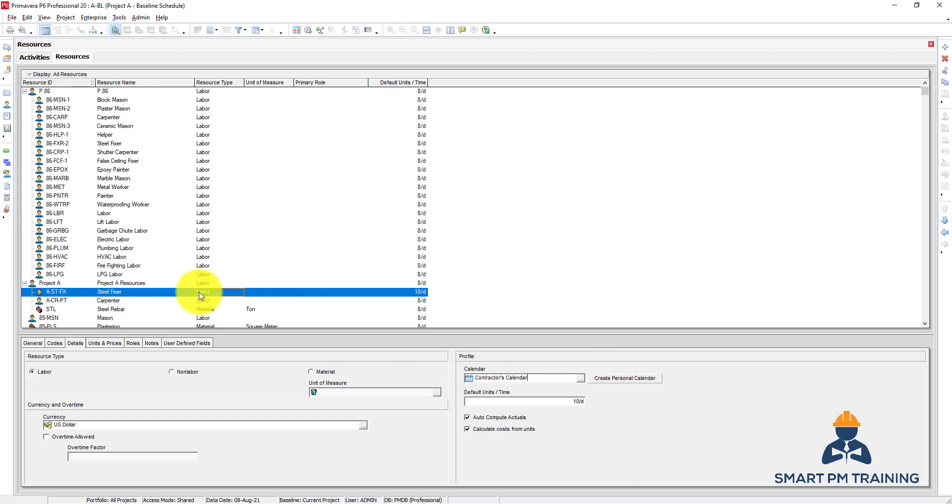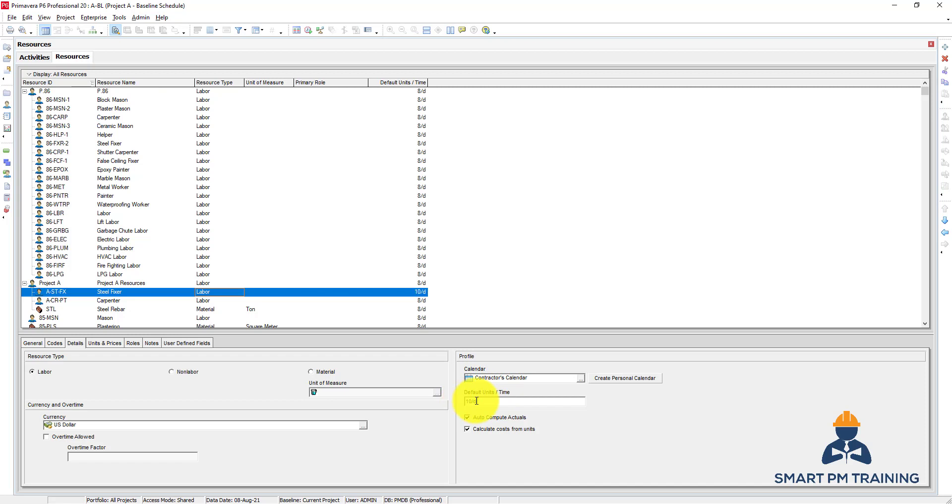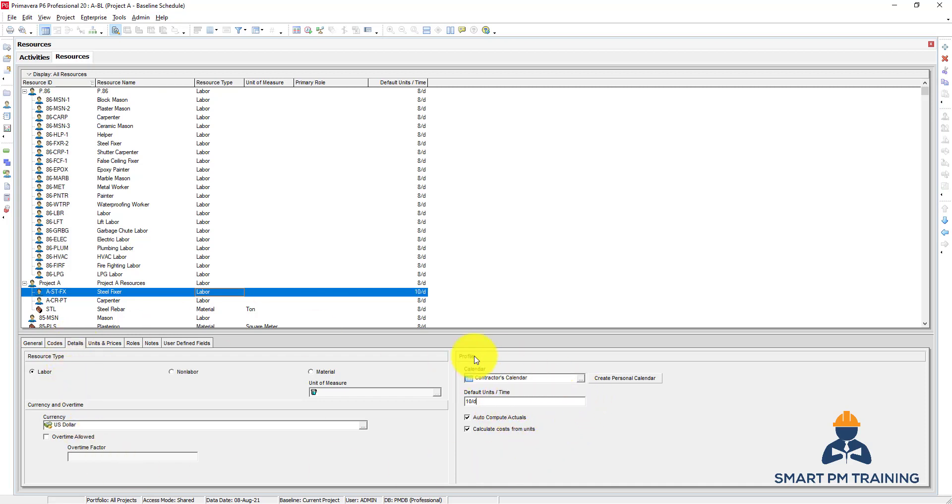So I would keep it the same, like the contractor's calendar, and minimize the resource calendar. So always stick with the activities calendar. And the default units per time - so 10 units per time is 10 hours per day. So this is what it means: 10 per day. So unit here for resources is an hour in this window, because unit will mean something else later when we explain in future videos. But in the definition or creation of resources, 10 is 10 hours per day.